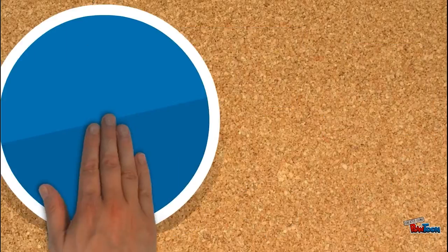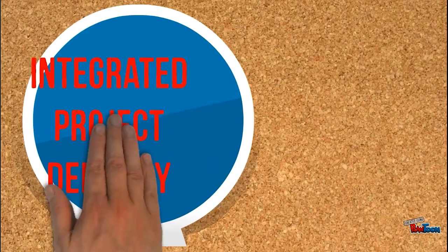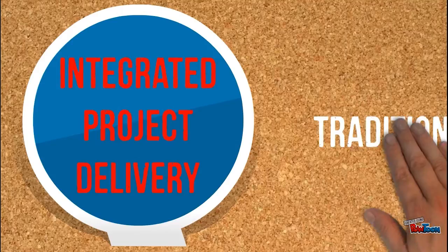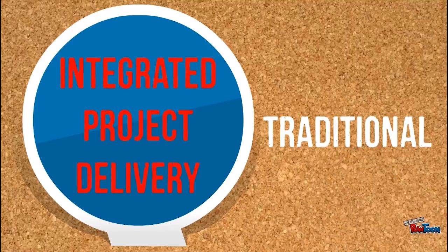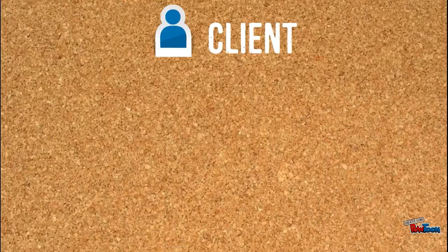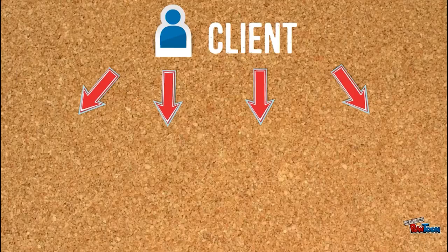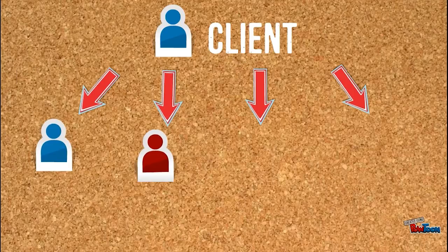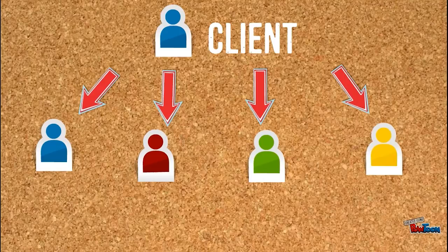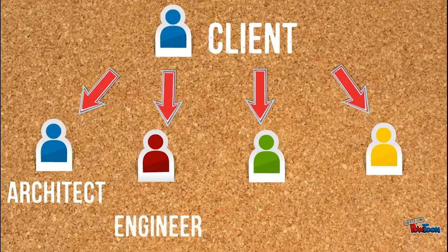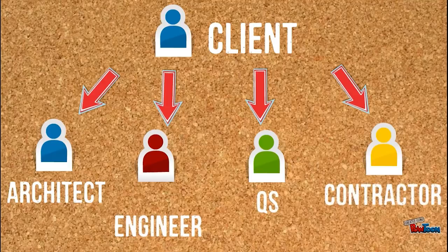As the project is carried out under the concept of the integrated project delivery, some of the steps of the process will be different from the traditional construction process. The client will form the core team by selecting and negotiating with different stakeholders directly, such as architects, engineers, quantity surveyors, and contractor, etc., instead of through traditional tendering stage.